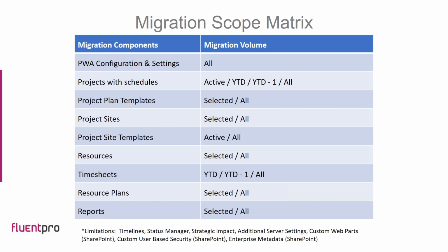Project site templates is an important component for project sites migration, because during migration, a project site is created in the new system, and it can either be created from a default project site template provided by Microsoft, or it can be created from a custom site template specifically created for your organization.